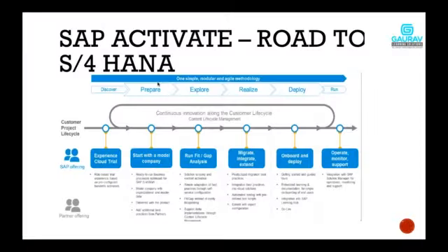Because, as I told you earlier, in SAP ASAP methodology we were not showing any system to the client in the blueprinting phase. The blueprinting phase was completely theoretical. We were just creating PDFs or Word documents and submitting them to the customers, and customers were seeing the screens only during the realization phase.